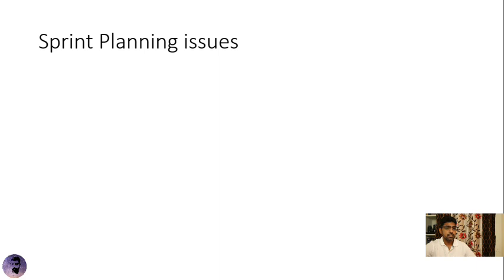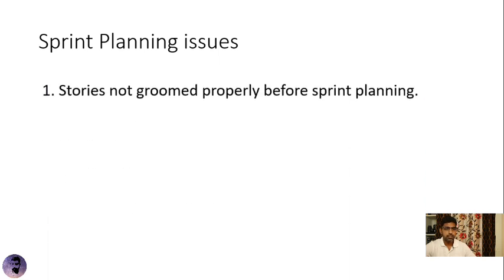The next one is some of the practical challenges that we will face in our day-to-day sprint planning activities. The first thing is the story is not groomed properly. Stories need to be groomed properly before you enter the planning stage. I see teams pulling in stories with just a description. They don't have an assignee, they don't have a description, they don't have acceptance criteria, and they request the team to give an estimate.